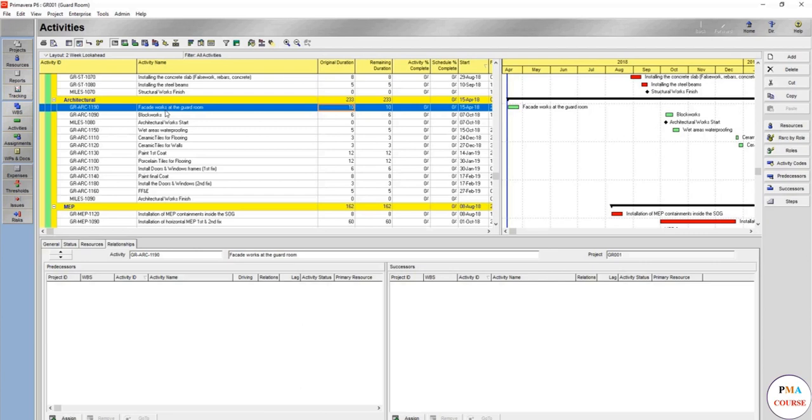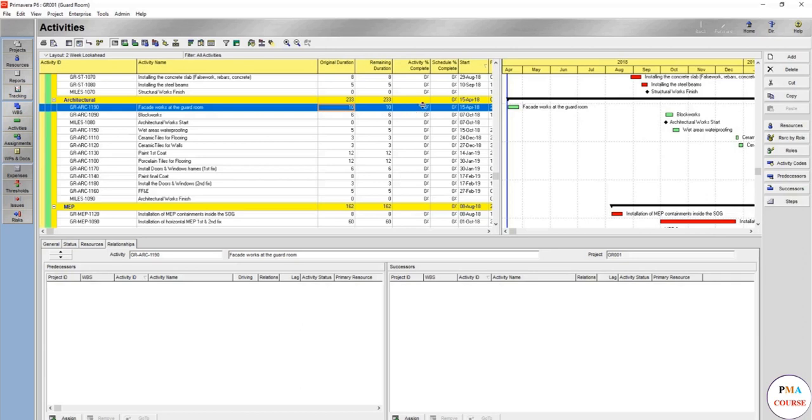How can you monitor each subcontractor by their main work? You cannot because it's only one activity. If you have a subcontractor for the GRC and another for the metal louvers, how do you know one is 50% now? How do you know who's working? How are you going to update and monitor and control the subcontractor?